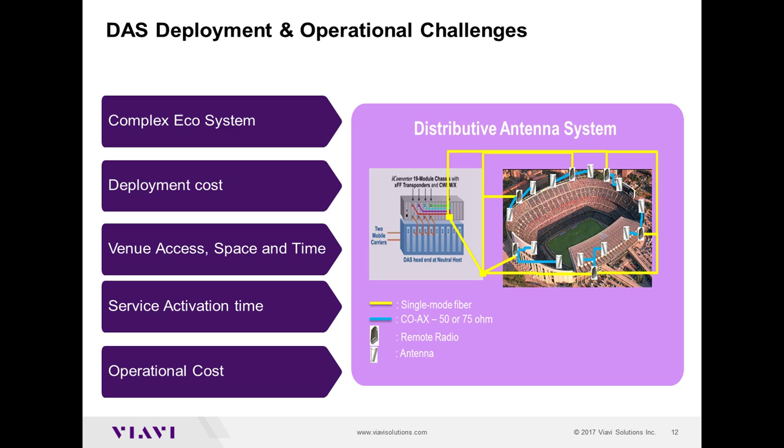Of course, deployment costs, we talked about it. Access to the venue is a big challenge. When I was deploying DAS, what we realized is that, for example, if there is a big venue and we have a game going on, we are only given an 8-hour window.